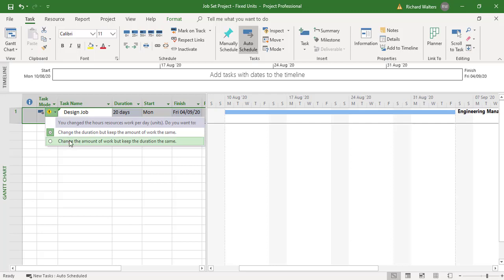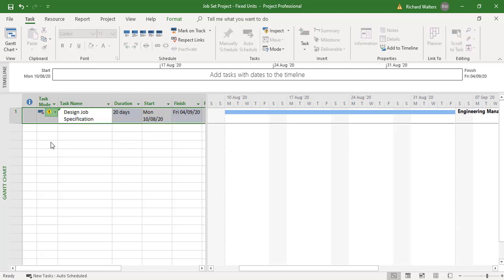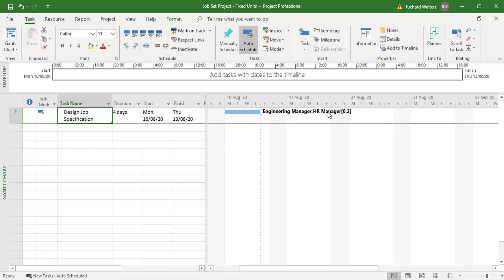Here we're going to change it back to keep the same amount of work — change the work which is the 20% but keep the duration the same. So this should now go back to four days. There we go — the HR manager is at 20% allocation.